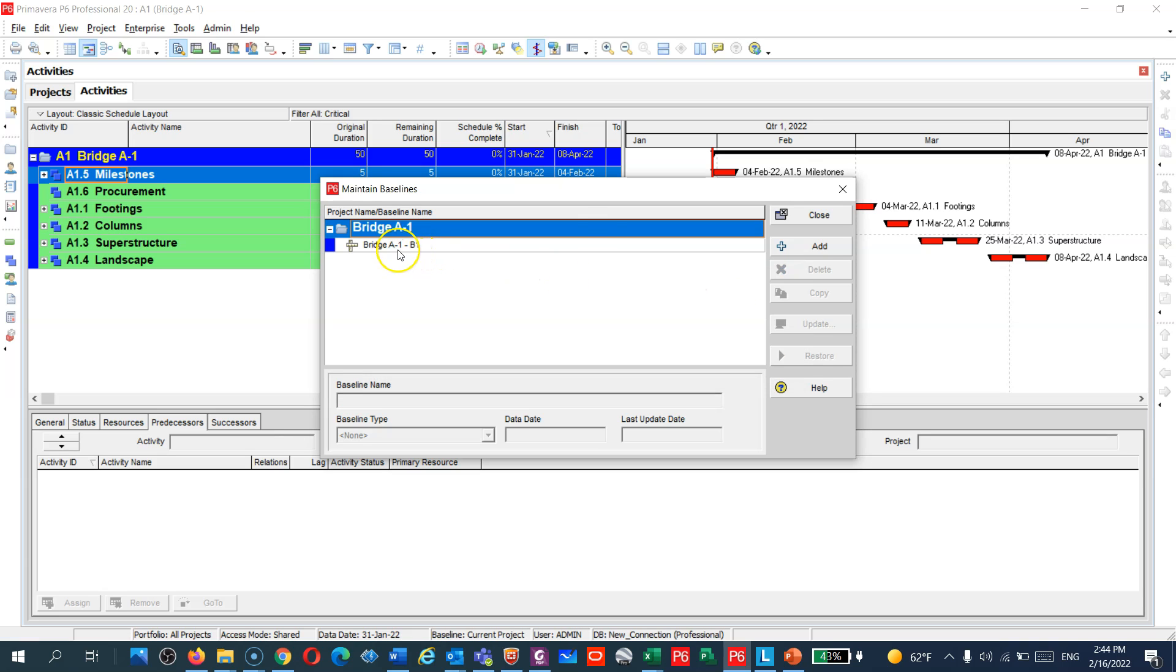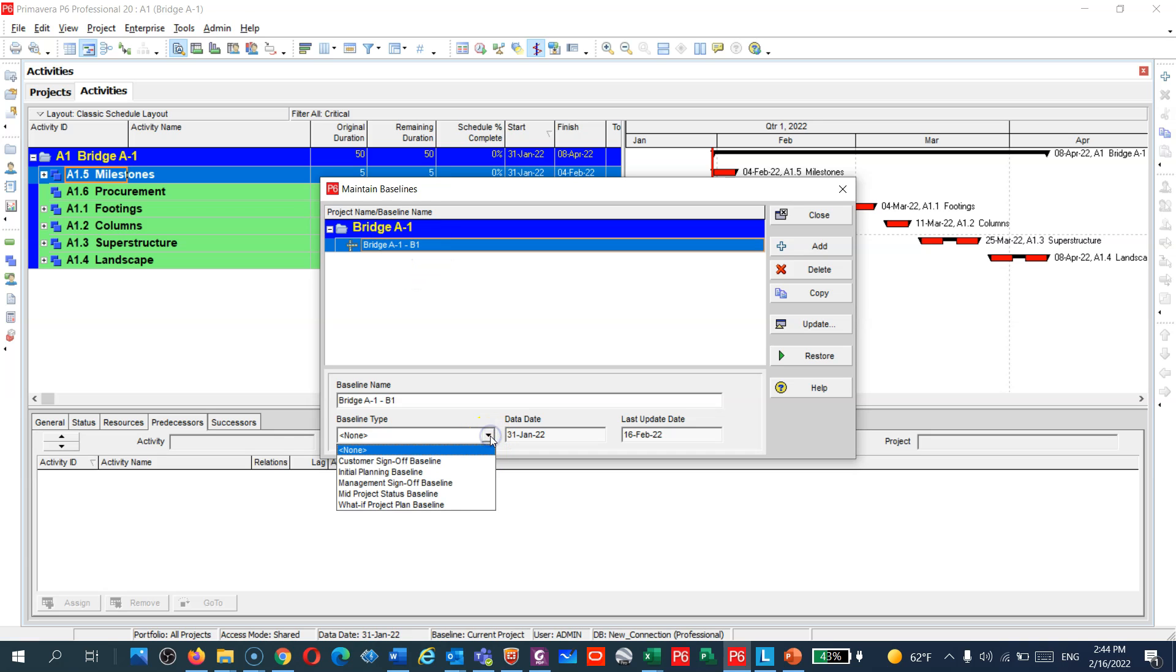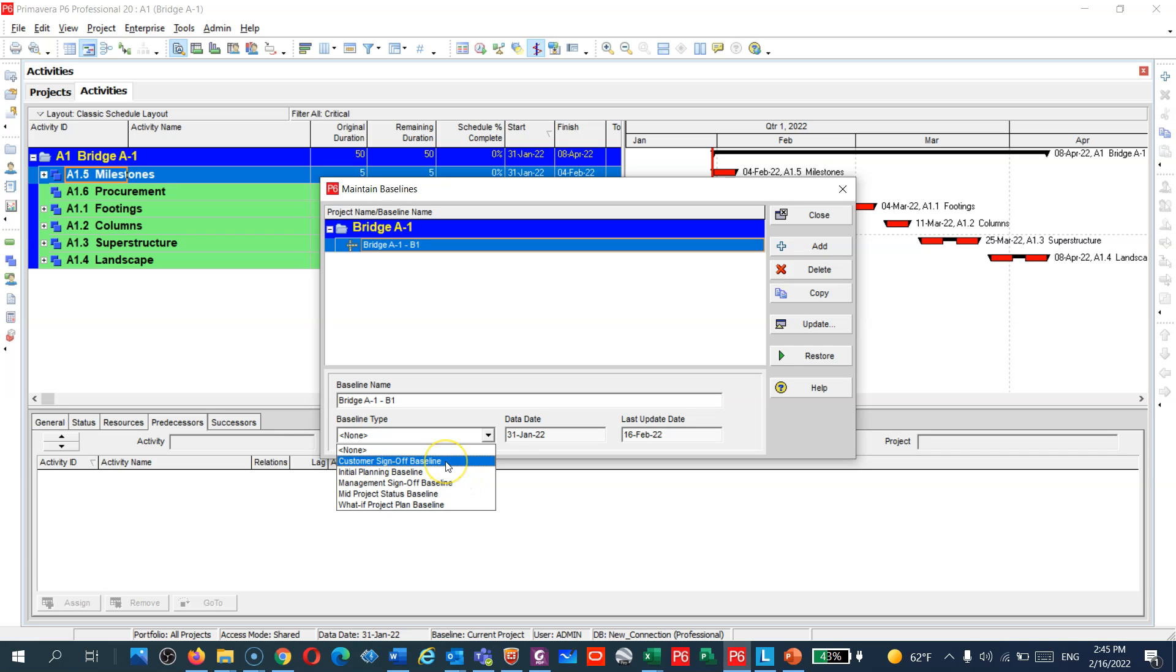And you can see guys here the program named it A1 dash B1, means the baseline one. And you can assign here what kind of baseline this is. You can assign many baselines. Is it the customer sign off, what you submitted to the client and approved, or is it your initial planning?